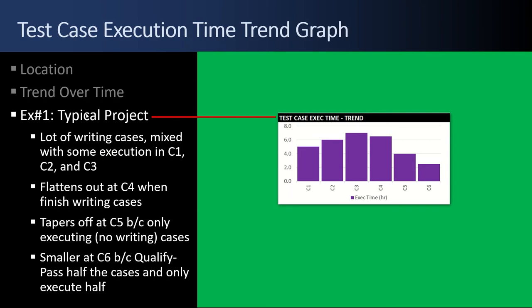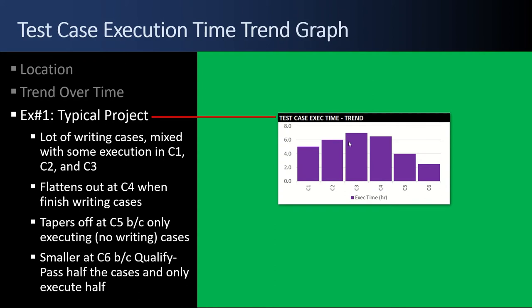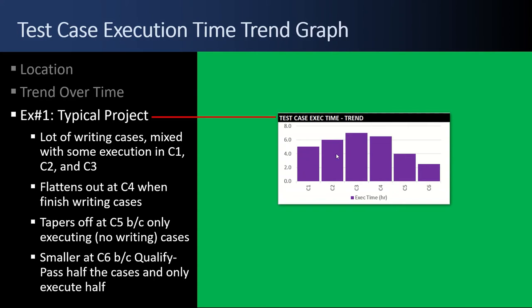This is the fun part of using this test case tool is tracking your time. So here in example number one, a typical project is going to look something like this. In cycle one, you're writing test cases and executing some. Test cycle number two, you're still writing and executing the new ones plus the old ones. By test cycle three, you really spend a lot of time with it. But then you've crested and by test cycle number four, you're not writing any more. You're just executing everything. Then by test cycle five and six, you're getting really uber efficient.